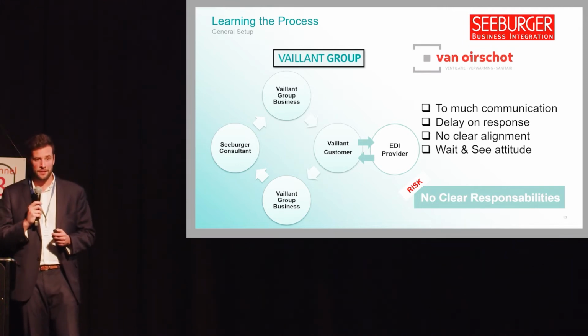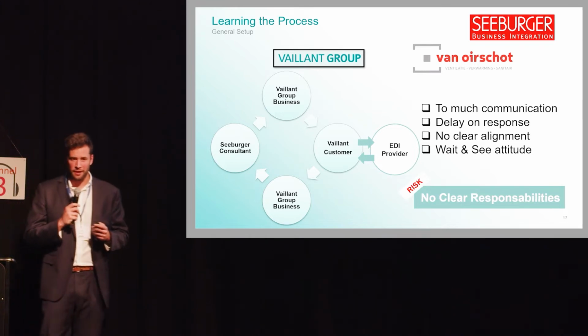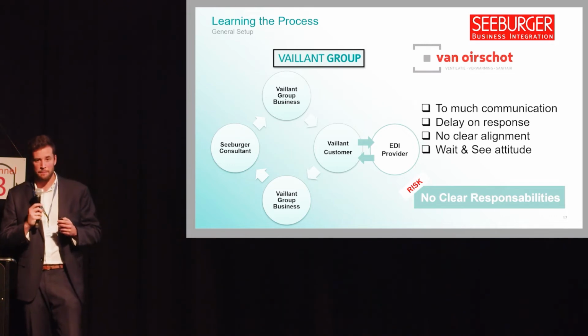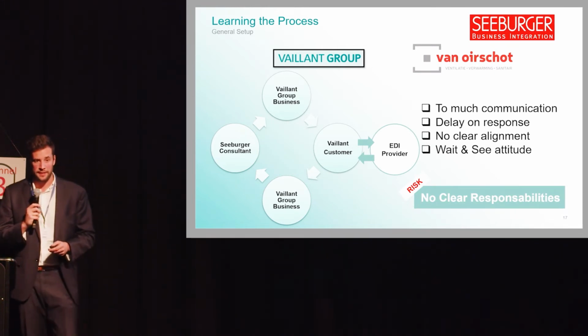The first 2 months were really messy because no one knew what to do. There was so much communication. No one knew concretely, is this question asked to me? What do I need to do? Is it a technical question? Is it a business question? So in the end, everything was a little bit a mess because there were no clear responsibilities.